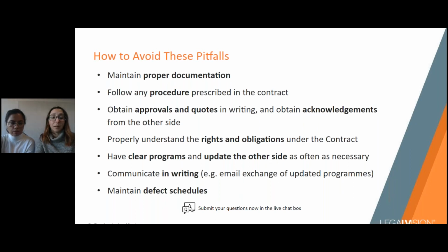And finally, maintaining a defect schedule. Again, following on the theme of maintaining the proper documentation, during the course of a construction project, it's very helpful to maintain a defect schedule and continually update it. They're usually prepared and maintained by superintendents for bigger projects.